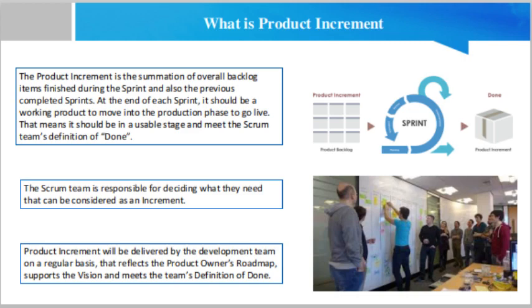Supporting the increment delivery across the organizational silos during the sprint is a big challenge for organizations adopting Scrum. In general, individuals through their local work practices will exhibit the actual values of the organization, irrespective of the exposed values. Having individual performance evaluations that strengthen local silo-based practices will work against this cross-functional work and will hold back the development team in delivering the product increment.